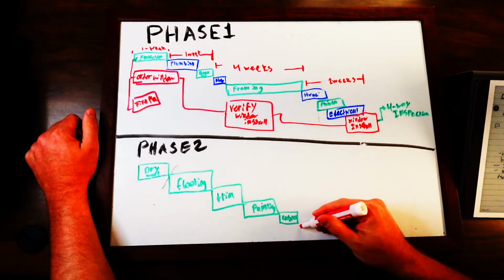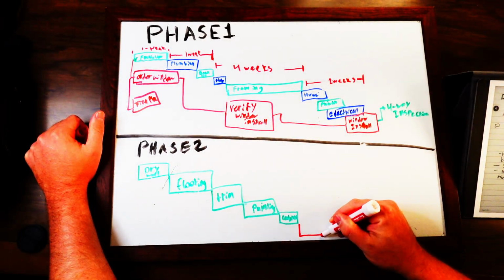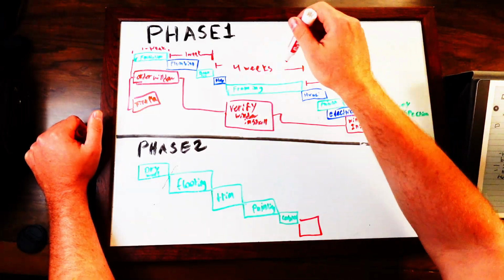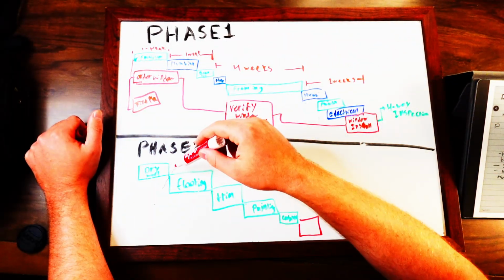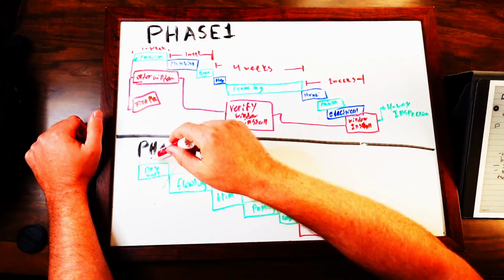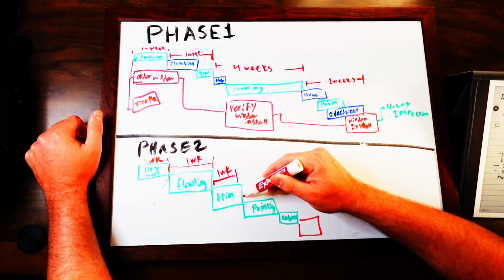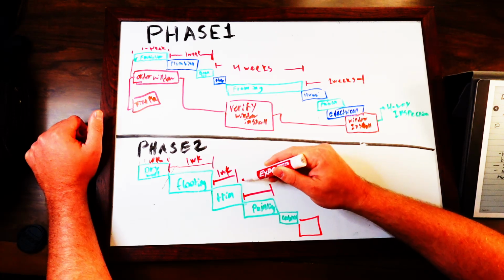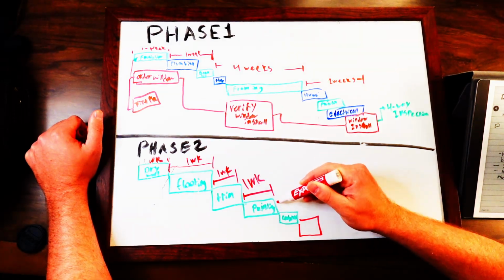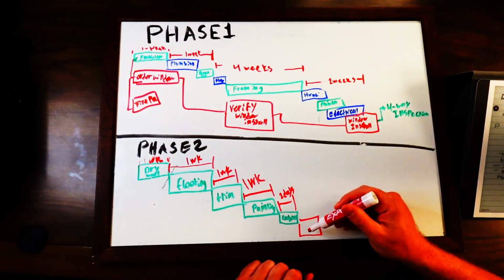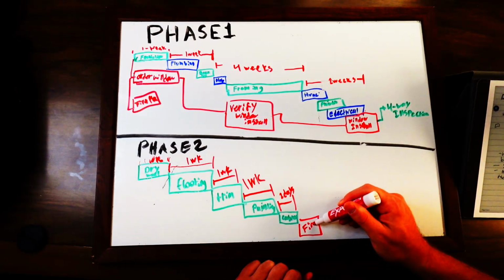And so if I order it during foundation and it doesn't arrive till cabinets are installed, that's a very long lead time. Because right here we have 8 weeks, and then here, let's say this is another week, a week here. These are all hypotheticals. These aren't actual timelines, but just to give you an idea, right? So if the fireplace isn't arriving till here, we're having to order 12 weeks in advance, right?